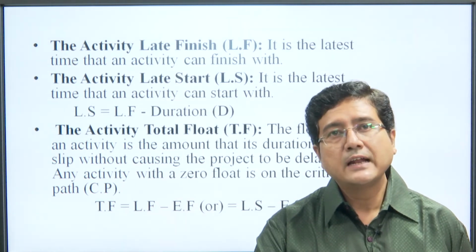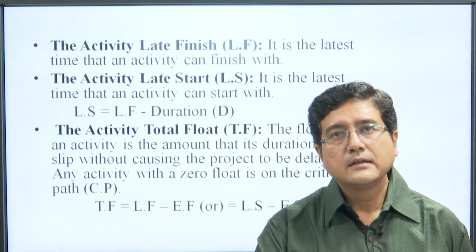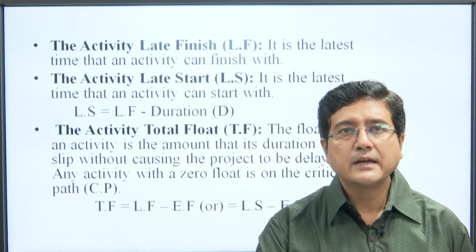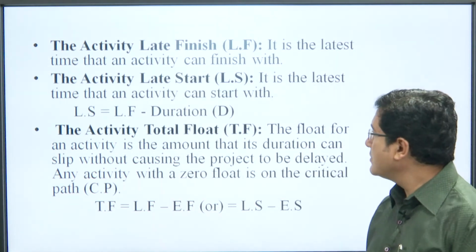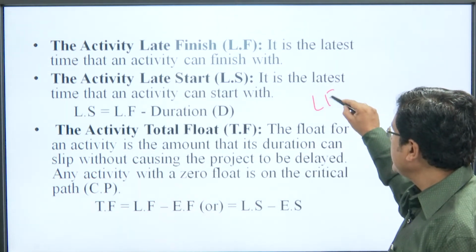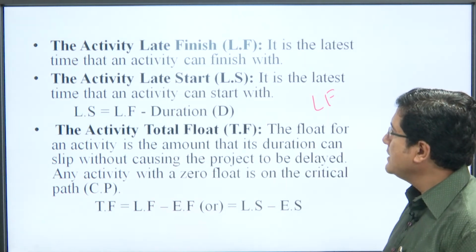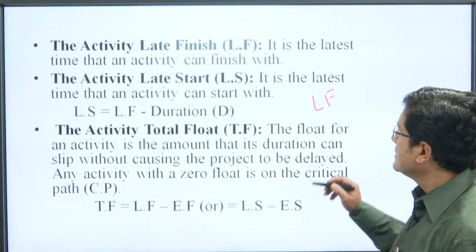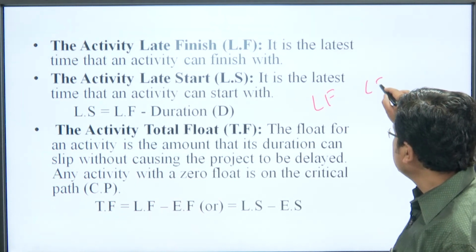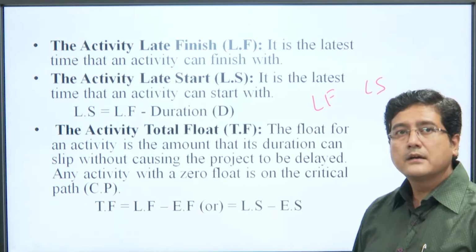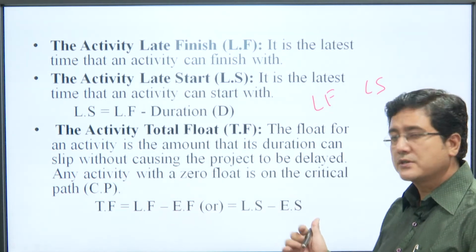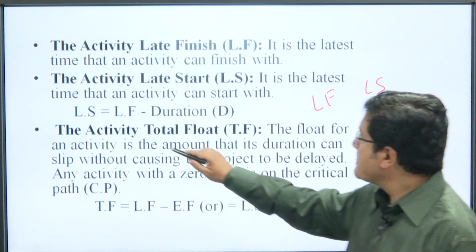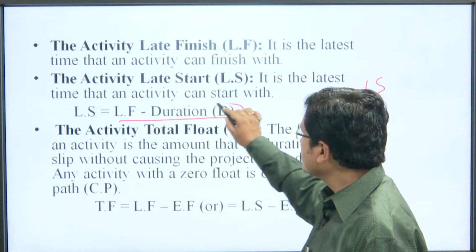Late finish, LF, is the latest time that an activity can be finished, and late start means the latest finish time minus duration.